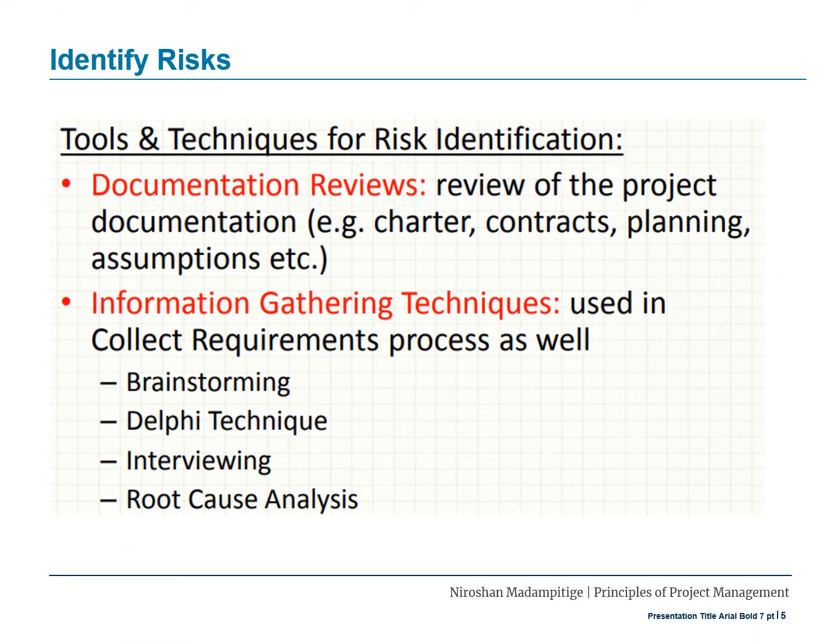Let's have a look at some of the tools and techniques for risk identification. One technique that is used is documentation reviews. Obviously, as the title suggests, review of the project documentation will help you to identify the risks. Example, some of the documents that you can look at are charter, contracts, planning, assumptions, and any other document. Information gathering techniques are another tool that is used to collect the risks. Used in collect requirements process as well.